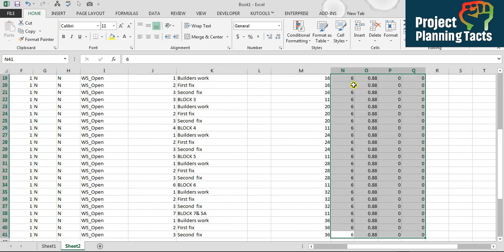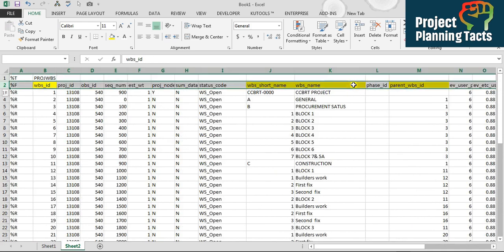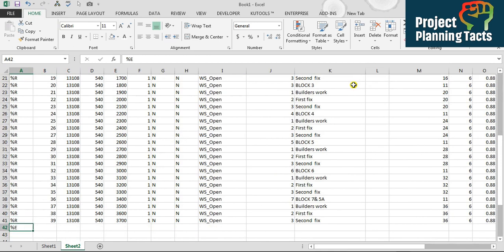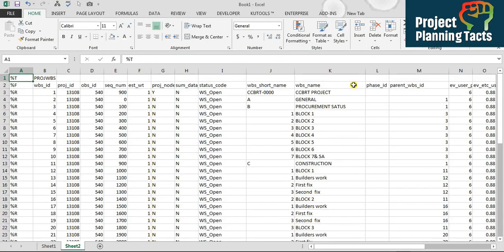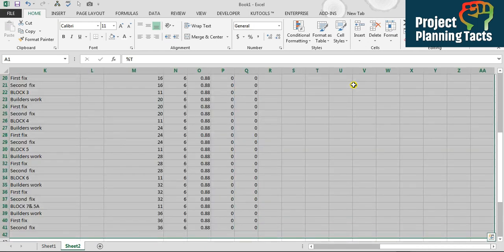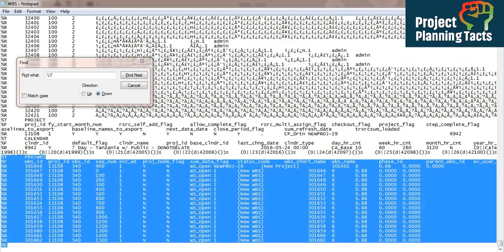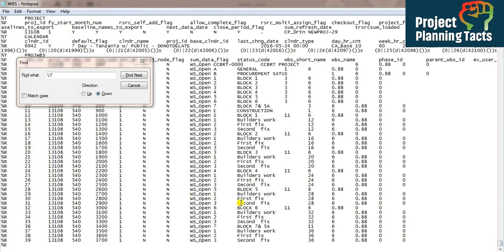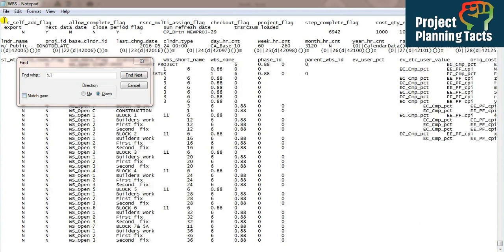I'll remove the color formatting and make sure the '%E' marker is placed just below the last WBS row. I'll save the file as a backup, then go to the first cell, press Ctrl+A to select everything, press Ctrl+C to copy, go back to the XCR file in Notepad, and paste these values — replacing the WBS section from '%T' to '%E'. I'll press Ctrl+V and everything is now copied in.